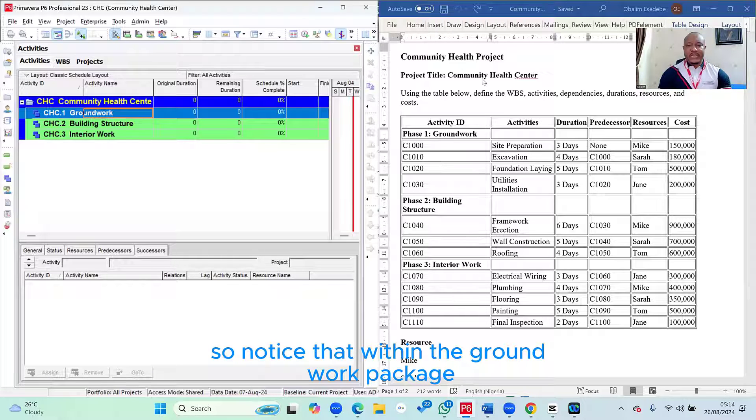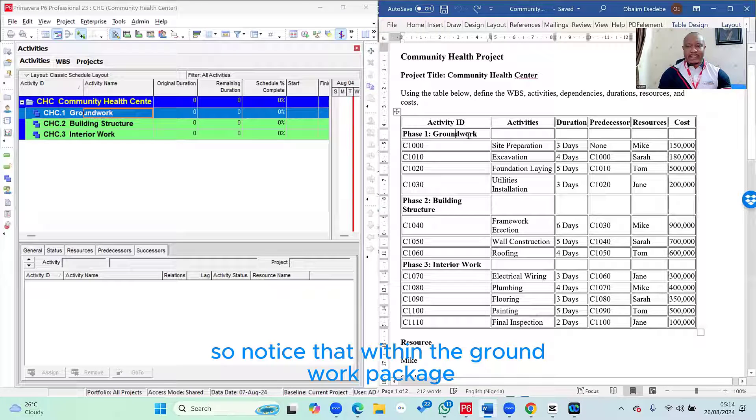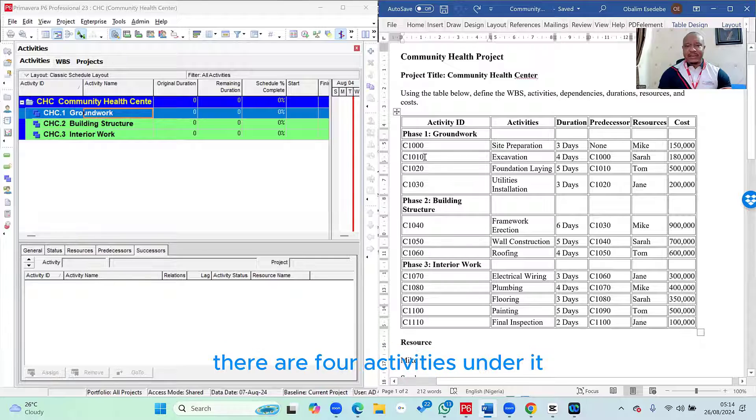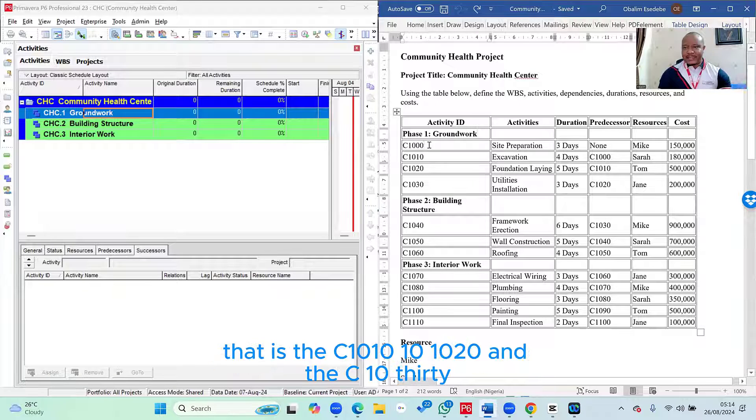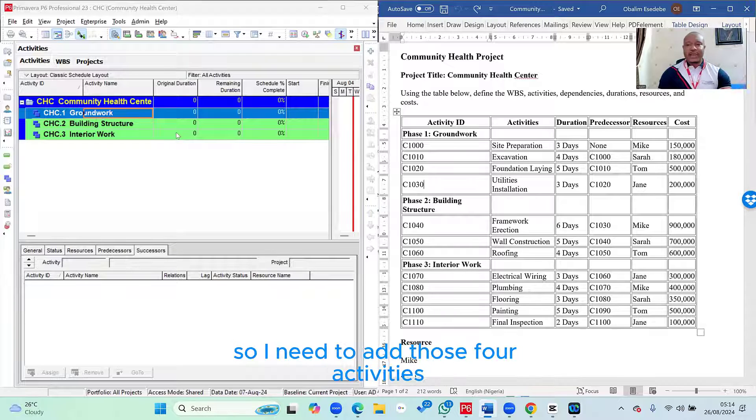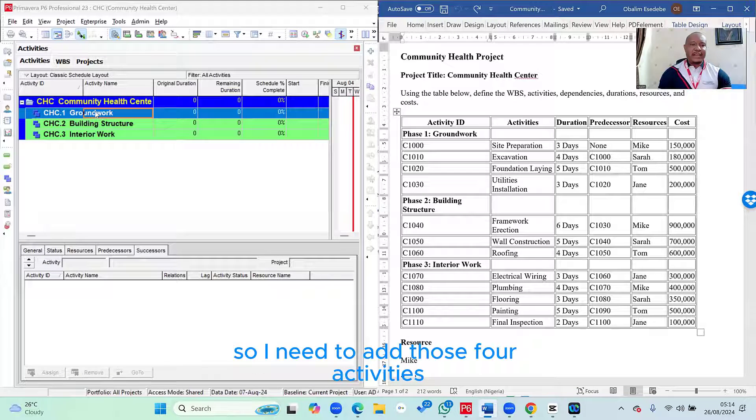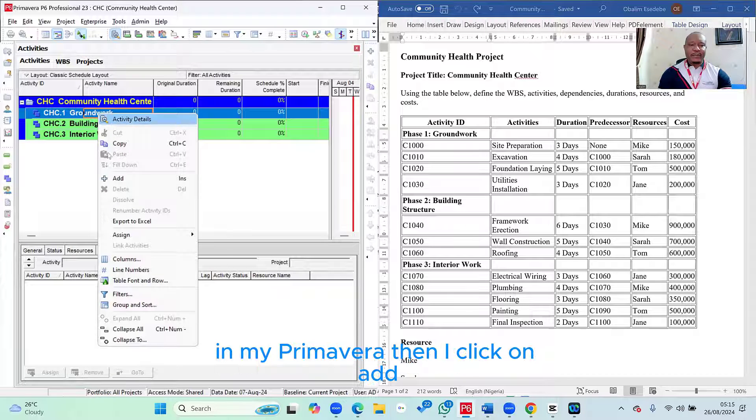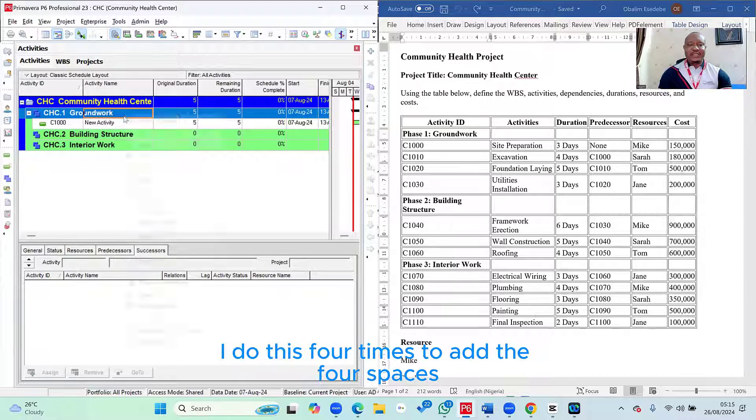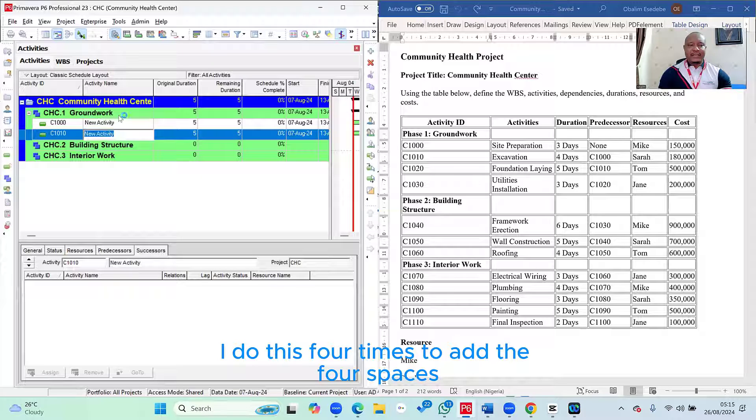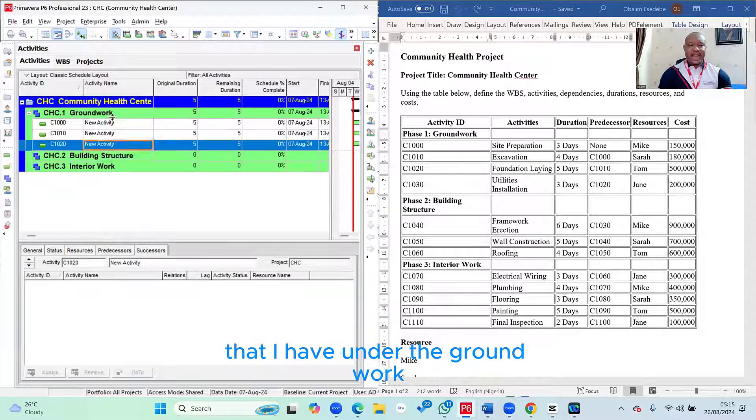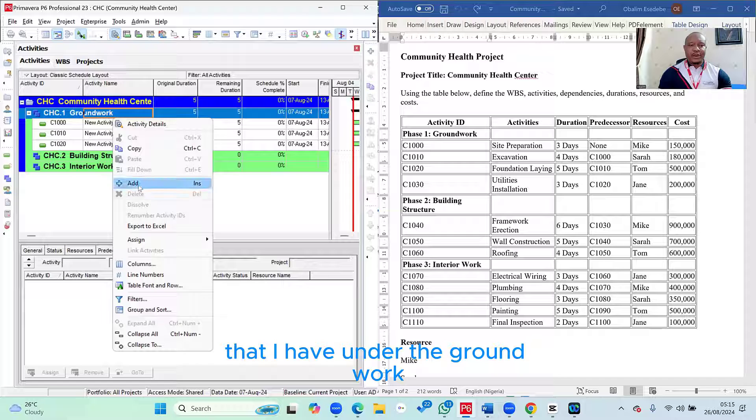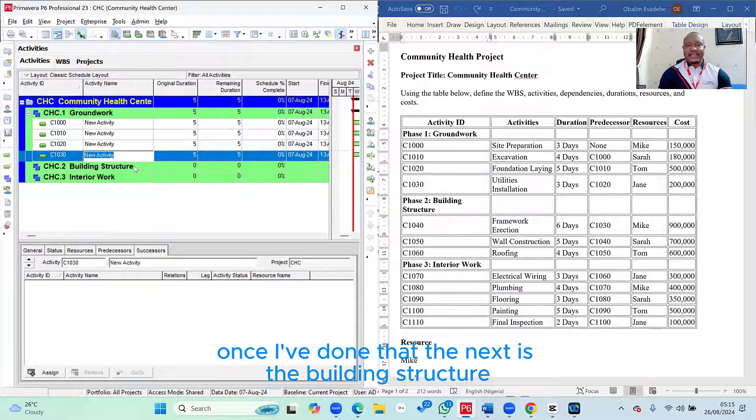So notice that within the groundwork package, the groundwork item that we have in our WBS, there are four activities under it. That is the C1000, C1010, C1020, and C1030. So I need to add those four activities. All I simply need to do is I right-click on the groundwork in my Primavera. Then I click on Add. I do this four times to add the four spaces that I have under the groundwork.